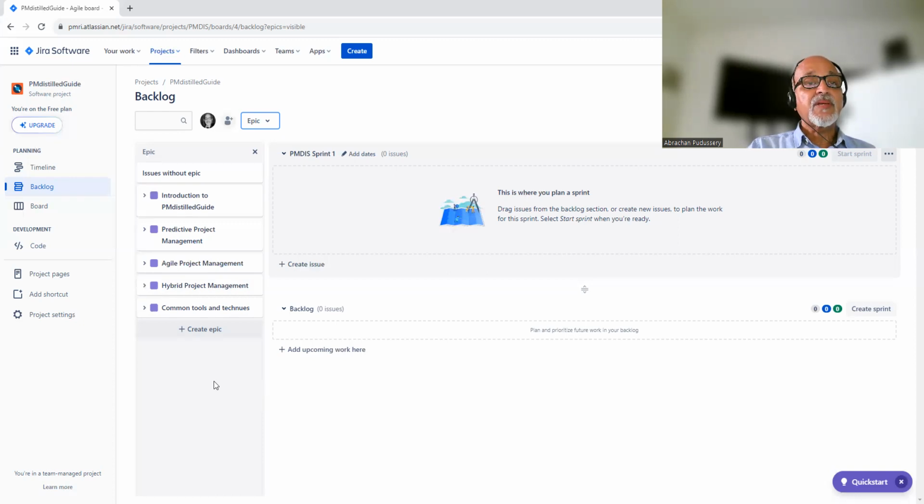So epics are very high level features which cannot be estimated, which have to be further elaborated. And this is how we define epics. Now, under the epics, we can define the user stories, which I'll explain in a subsequent video.